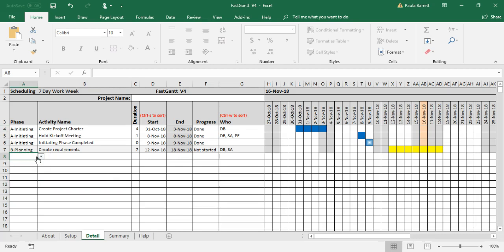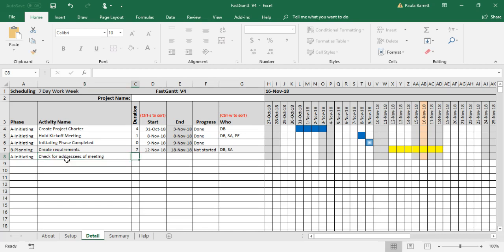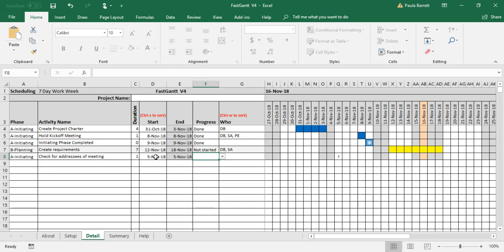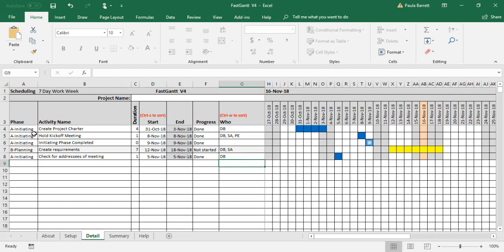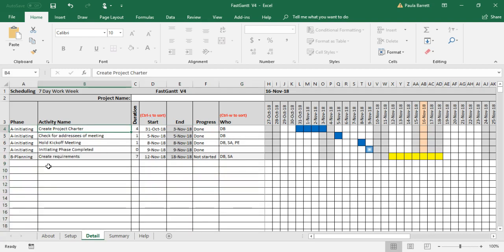If we want to insert something, what we do is we put in what we want at the bottom. So let's say, for addresses of meeting and that's a one day task and we would like that to be in or around there, let's say November 5th. And yeah, it is done and it was done by me. Now it's kind of out of order here and we'd like it to be up there, but we can't insert it there. So what we can do is there's a macro called sort. If we press control S, it resorts by phase and then by start date. So you can see that it got pushed into the right place. And that's something you should do fairly often.